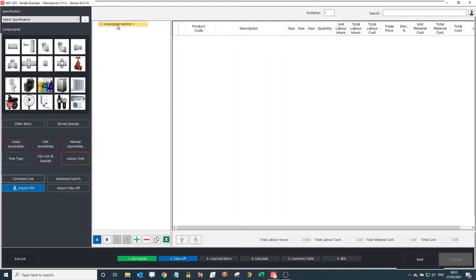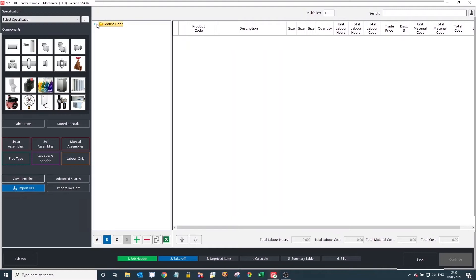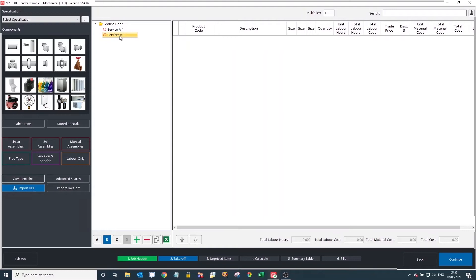The first thing we'll look at is the sectional structure. What we can create with this is a tender breakdown — whether this is your own or something you're going to have to follow. It's very similar to Windows File Explorer, with the same logic of having files inside folders. I'll make a brief example with 'Ground Floor' as an A-level section, and within it two B-level sub-services. I'll call them Service A and Service B. You can add as many B-levels as you'd like, and break it down further into C and D levels if needed.